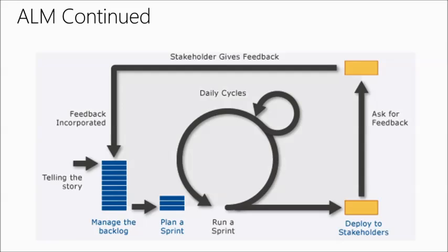So pull us through an application lifecycle management environment. Okay, so this is an agile project that we're highlighting. You see the blue stack there, and that's the whole backlog. You take an arrow to the right, and you go to plan a sprint. Like we mentioned before, you're in Module 2, picking whatever fits into that sprint. Say your sprint is 2 or 3 weeks. You're grabbing your 3 items that you want to include.